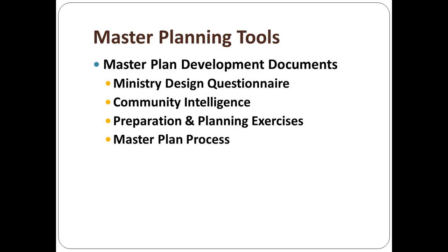So if you can't build everything you want in the first phase, then you bump certain things by setting priorities to the second phase. But you've got to go through this exercise conceptually and strategically to help you do three things. A needs analysis determines how the ministry space should be designed. A financial analysis determines the size of the project. And then you have to balance together number one and number two. And you do that from the outset so that you can stay within the budget to build your building. There'll be a temptation for you not to do that.